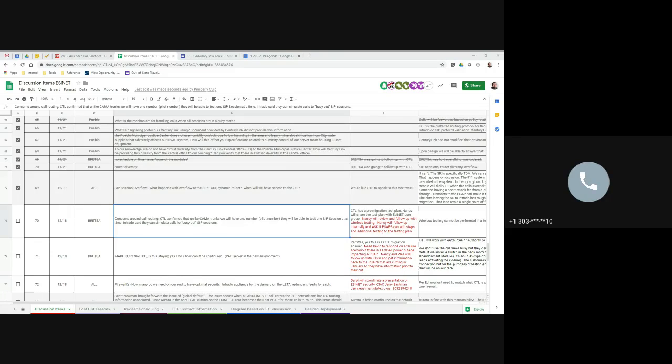The team was able to make those updates, but we cut Longmont over, made a number of test calls, tested the transfer case, and it didn't work. We cut them back while we resolved that issue, and then moved them back to the ESInet. We don't want to do that, so it's just an item to add to the checklist during pre-migration to make sure that if you have any shortcuts programmed onto your computers, they've been updated to the new 3-digit star code transfers.